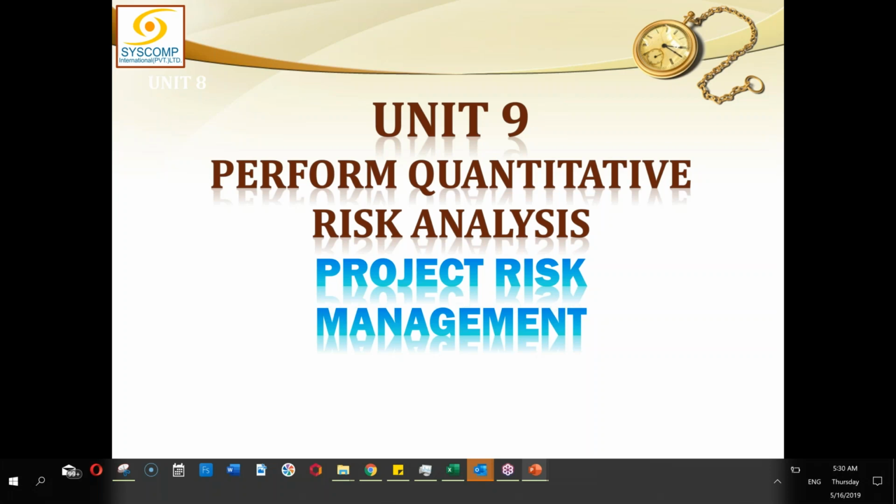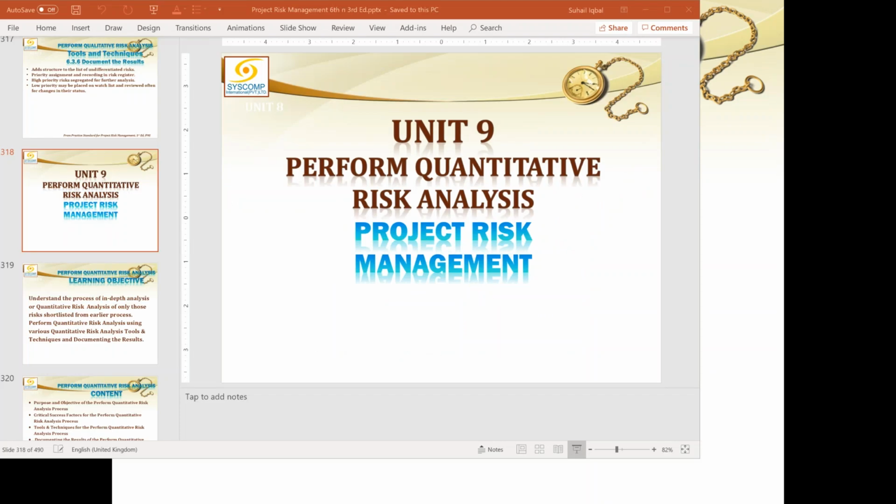The very simple rule is, maybe if it is a 20/80 rule we are following, then the 80% impact I have captured, 20% impact is with the risks which are not shortlisted, right? So for example, if for treating these 80% risks, I need, for that matter, 80,000 rupees. If I need 80,000 rupees to treat these 200 risks, then how much do I need to keep in contingency? If 80,000 rupees I need for these 80% risk, then how much should I keep for 20%? Naturally, that would be 20,000. Are you with me? Is it all right?